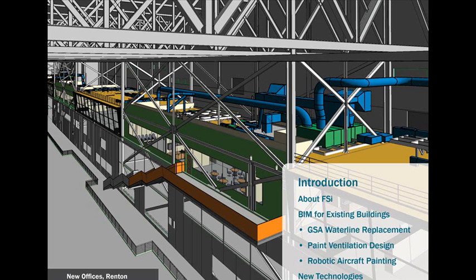Yeah, and like Brennan said, on that project, it was $3 million worth of duct work, and they do a lot of work around here, and so we've actually shared two or three Revit models with them. And it was actually really useful to them for us to give them our Revit model at the different design submittals, because they could just import that into either AutoCAD MEP or into Navisworks, and at least it gives them a starting place to detail everything out. So I see it only as being a help for consultants to be working in Revit in a design build scenario, just because it speeds up the contractor in installing and getting their model together. No sense in everybody drawing it twice. Yeah.